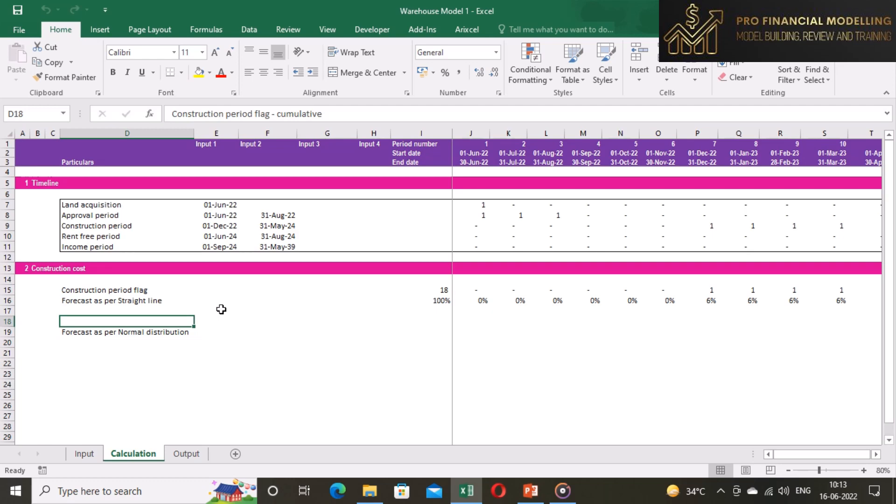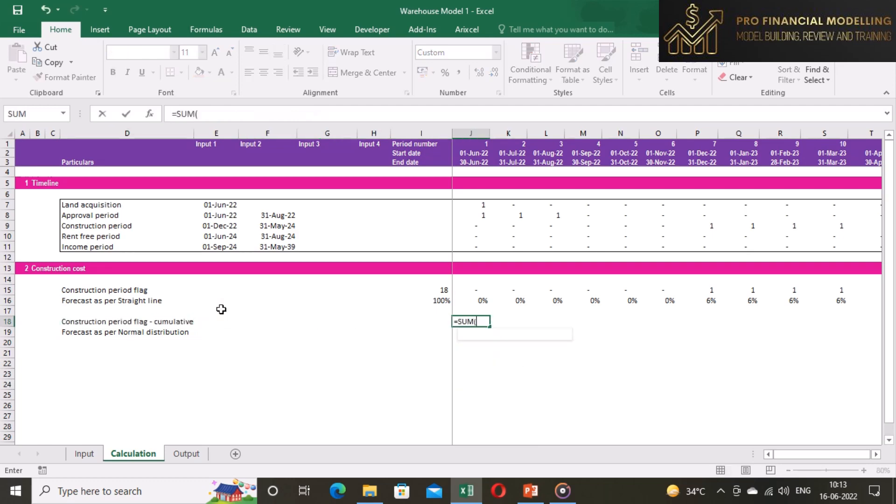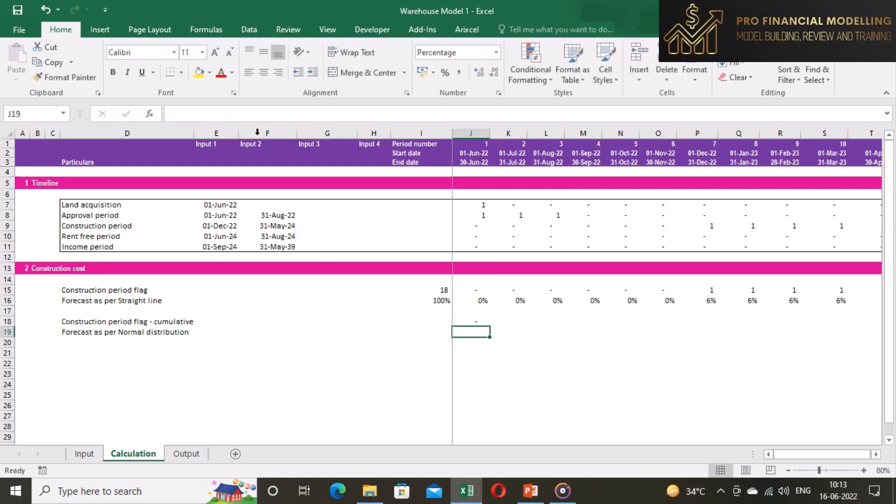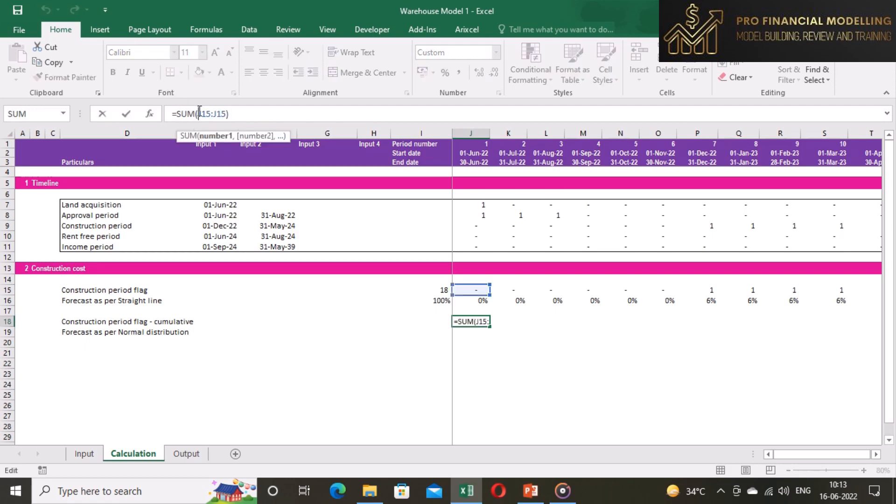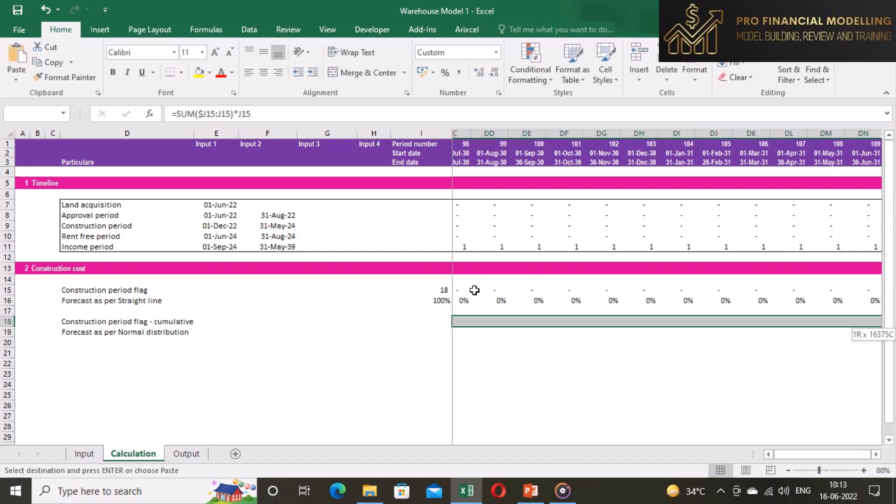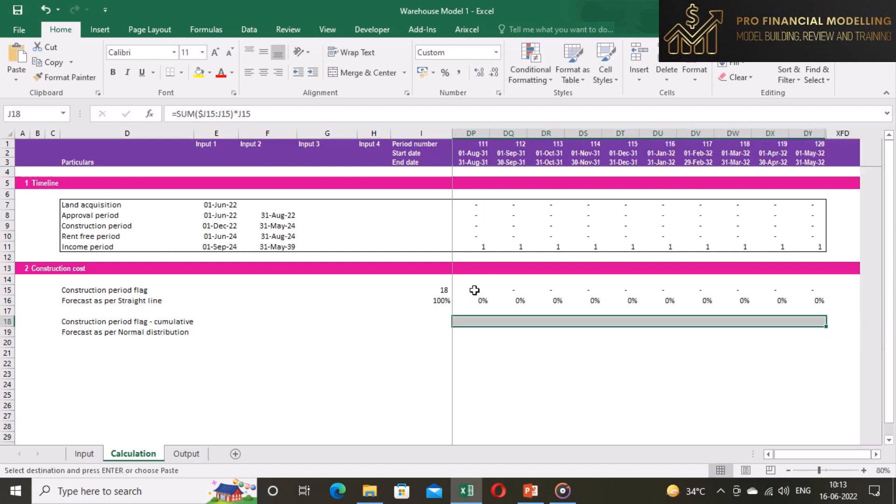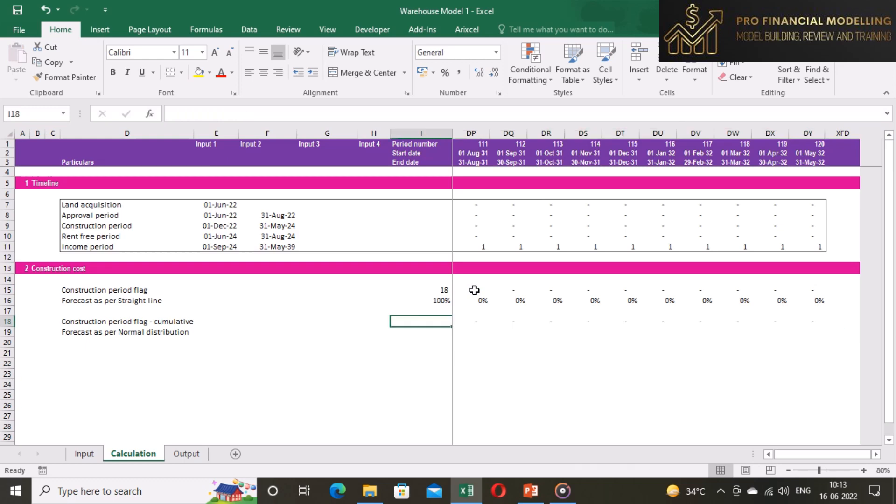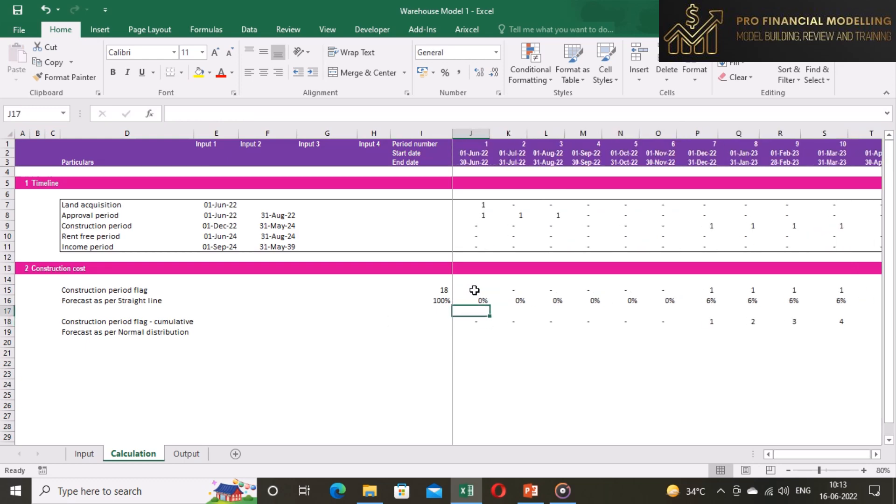Let's start by our first step by computing the cumulative construction period flag. The cumulative construction period flag will show the month of construction period. The cumulative construction period flag will be multiplied by construction period flag so that it will have zero value in period other than construction period.